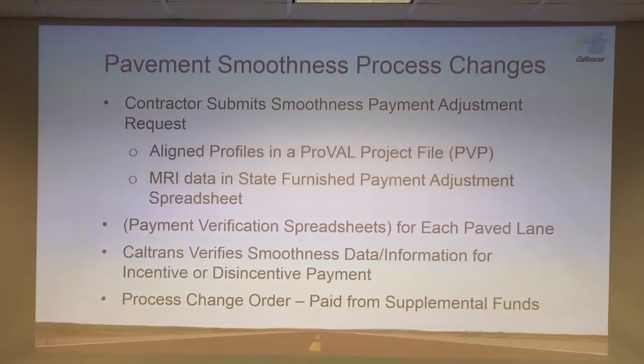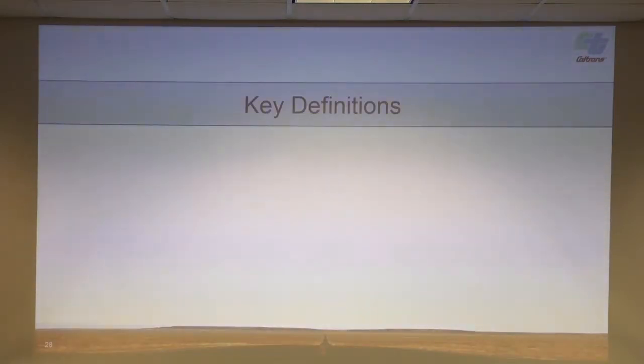Contractor to submit payment adjustment sheets, and Pete will get into that. We're utilizing ProVal project files and the MRI put into our spreadsheet, and then Caltrans verifying the spreadsheet and processing payment in the supplemental funds. Of the presentations. So. Okay, thanks, Blair.